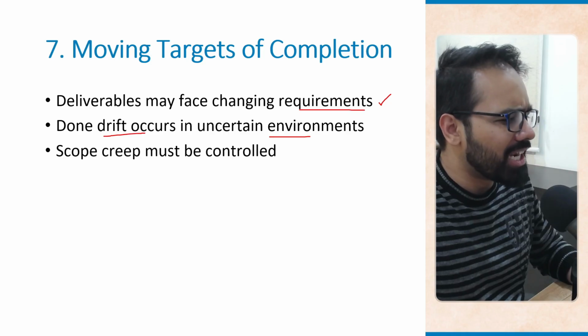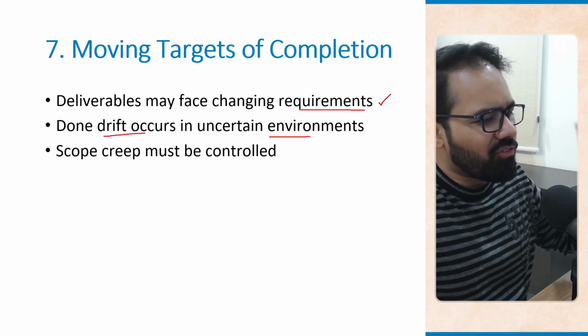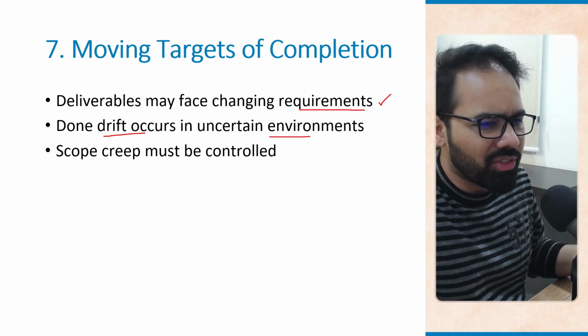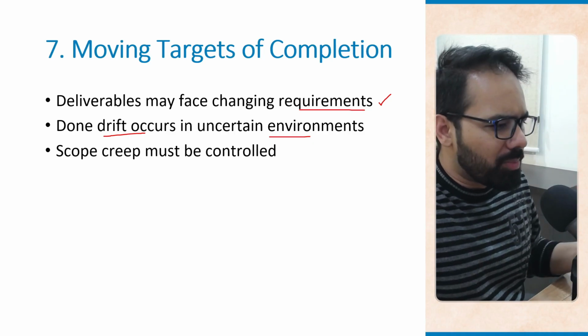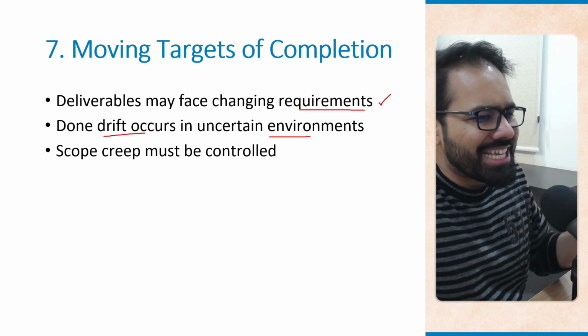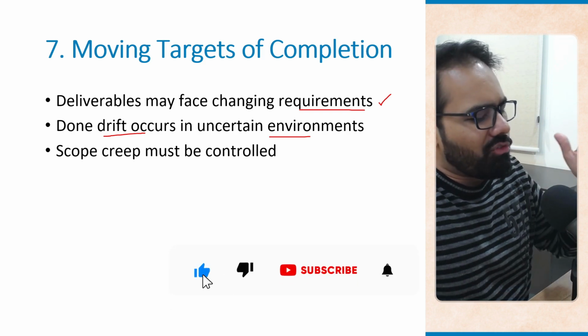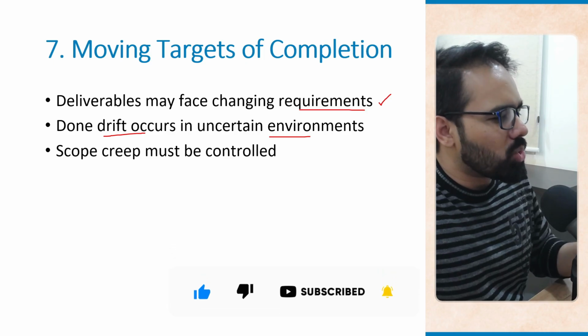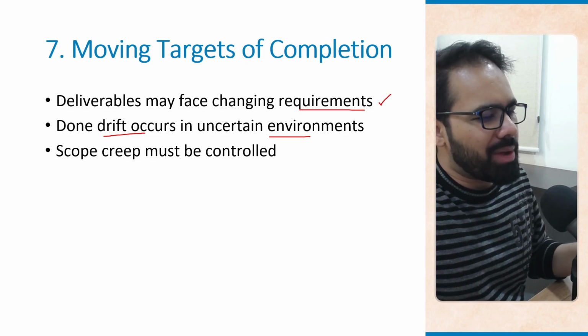Scope creep must be controlled at all times. If marketing requests extra features without adjusting the budget or the schedule of the project, it is risking failure. So a formal change control process should be in place because it is going to prevent uncontrolled expansion. Now, a lot of people tend to think that in agile ways of working, there's no change control. The comprehensive change control exists only in the waterfall model. But that is not the case.